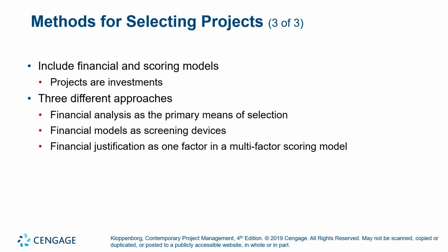Methods for selecting projects. They include financial and scoring models. Projects are investments. There are three different types of approach. There's financial analysis as a primary means of selection. There are financial models as screening devices. Then there's financial justification as one factor in a multi-factor scoring model.